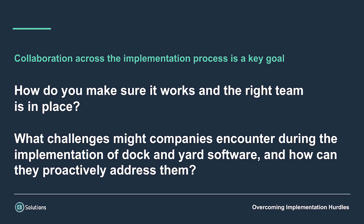Yes, great. Training is critical. Well, first of all, our methodology is, as I said, we map the business processes. That first exercise in trying to understand what the states and transitions are for a specific process is critical and really starts the conversation. What we've found works best is, once we have those business processes configured, we do an initial configuration with the client. So we always try to involve one or two leading business users that will be involved throughout the project. We call them our super users, and most of the time they're really super users. They're incredible. They have to understand business processes, and they have to understand how the system is configured, and they have to own it as well.